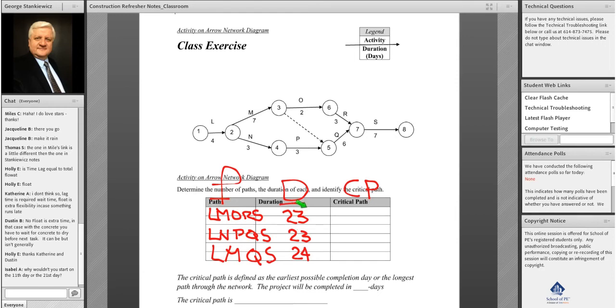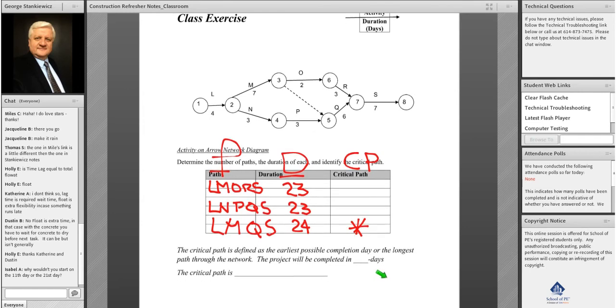Now we can analyze the project and determine what is the longest path through the network, and that is our critical path, or the earliest that the project can be completed is on day 24. So we're done. We've identified it, and the project will be completed in 24 days and our critical path is here.